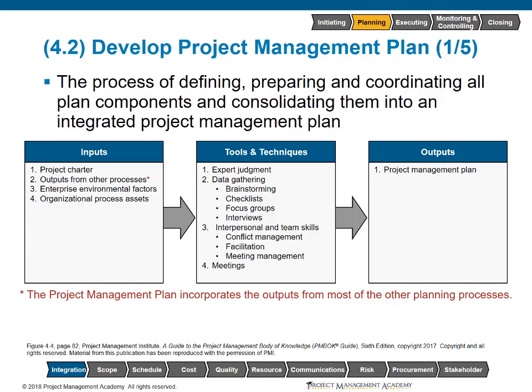Develop Project Management Plan is a process of defining, preparing, and coordinating all plan components and consolidating them into an integrated project management plan. The project management plan will define how the project is executed, monitored, controlled, and closed. The project management plan's content varies depending on the application area and the overall complexity of the project.